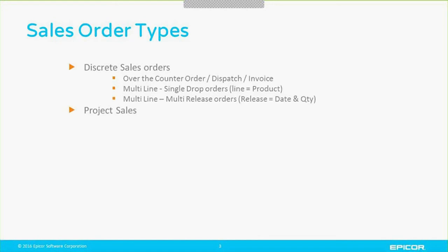Whereas in a project, you may be looking at multiple phases, multiple products, installation and commissioning, varieties of elements, and you may take those out and drop those out into bid teams that are experts in their own separate areas. So against a project, you could have multiple quotes, driving multiple sales orders off those quotes, all linked to the same project, with the potential of them being different billing methods. I may want to do billing methods for projects, time and material, fixed fee.